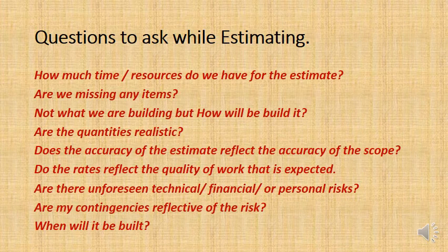But the constructor is going to be thinking, if it's on a hillside, that means we need to get a much bigger excavator. That means we need to get a driver for the excavator who's got more experience, and so his labor rate might be higher.